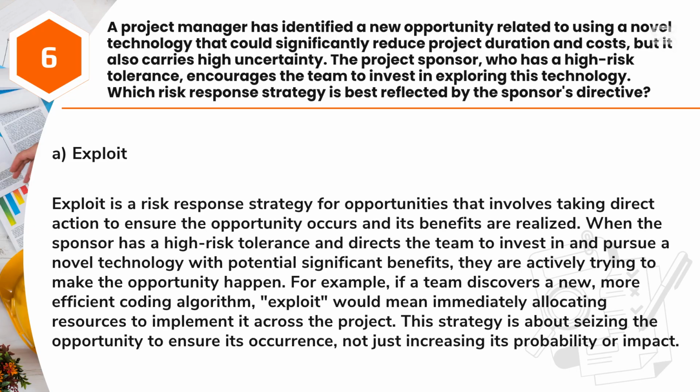Answer: A. Exploit. Exploit is a risk response strategy for opportunities that involves taking direct action to ensure the opportunity occurs and its benefits are realized. When the sponsor has a high-risk tolerance and directs the team to invest in and pursue a novel technology with potential significant benefits, they are actively trying to make the opportunity happen.